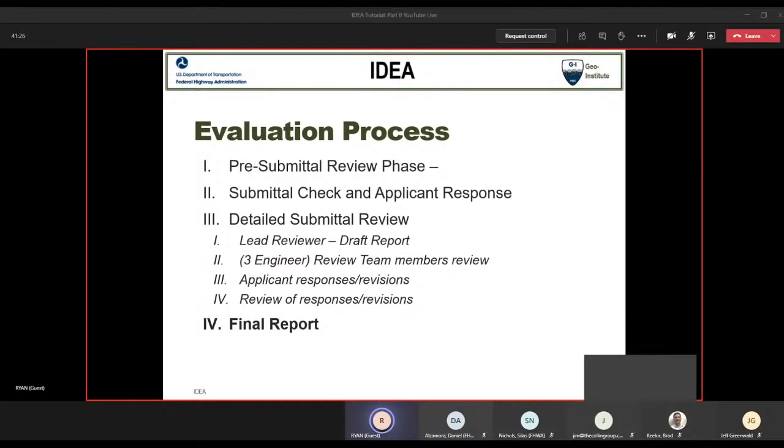So again, in the evaluation process, that takes us through milestone 3 as we work through all of the submittal, work through the protocol, through that checklist, review all of the laboratory test reports, review all of the design parameters and so forth. And with that, again, there's interaction with the wall system supplier. They may be asked to clarify or add to or subtract from their submittal, or there may be inconsistencies between an appendix and a section pointed out that need to be clarified and so forth.